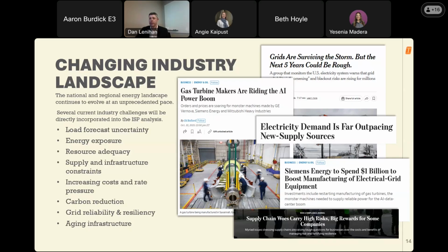Along with that, there have been some significant regulatory landscape changes. There was a federal administration changeover during the last election, which has flipped various energy policies in this country. And finally, most are familiar with the supply chain and inflationary cost impacts in the post-COVID era, but those two things hit the electric industry really hard, where lead times for major power equipment and cost for that equipment both more than doubled over the past 5 years.